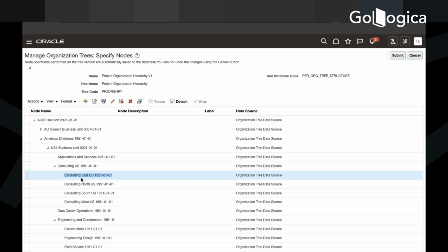When you said BU and then a department, I was thinking that if this department has say 100 employees, but only 20 people are assigned to this project, it would bring all 100 employees' cost and then calculate the fringe and all that. But it's going to bring those 20 people, whoever is assigned to that project, their cost, and then apply the fringe benefits. Is that right? Yes.